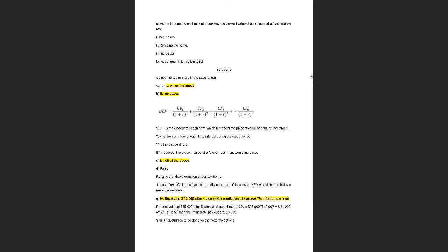If you remember, there was a gap of 1 month from submitting the design to starting the construction. So if this was not in the holiday period, then this would not have been considered a top priority. Further, he writes, this example drives home the idea that project management also needs to consider the situation context besides the number of days and cost.